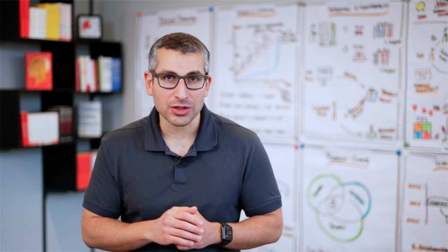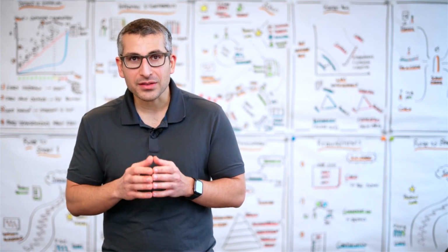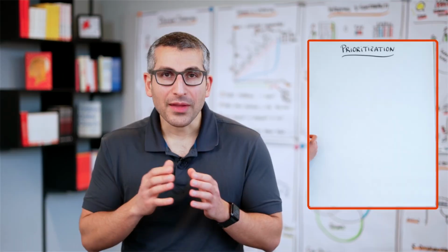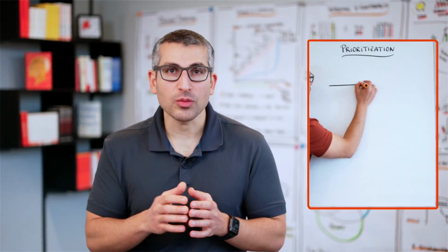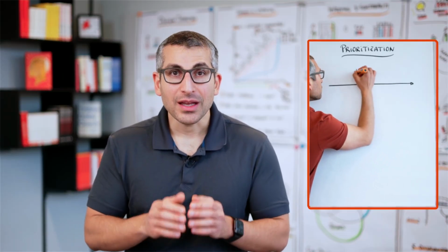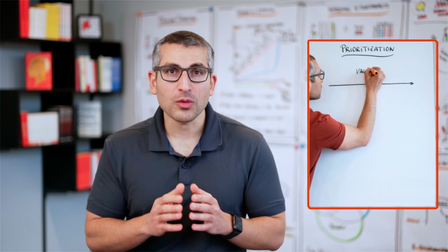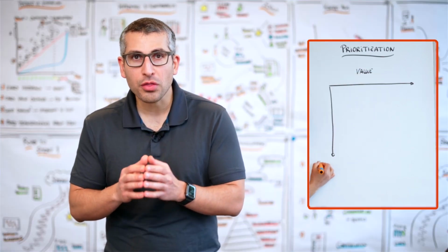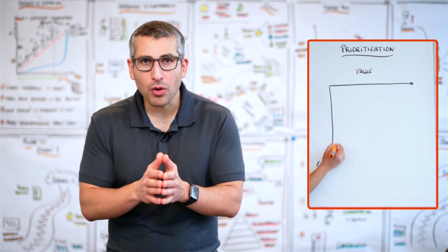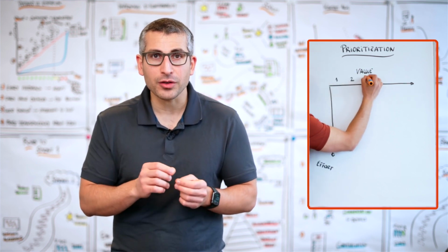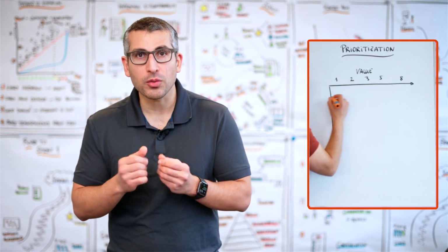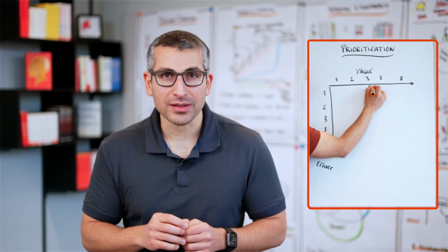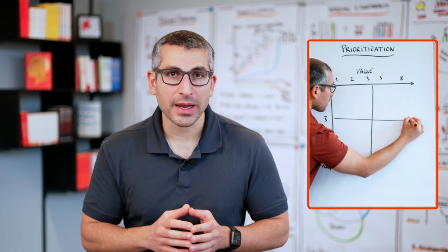Once we have these numbers in terms of effort and value, we can use this for a very simple prioritization. In order to visualize this, I usually use a matrix. It looks the following way. At the top, from left to right, we have our value axis. Then, from top to bottom, we have our effort axis. Based on our scale 1, 2, 3, 5, and 8, both for effort and value, we get to see 4 quadrants.